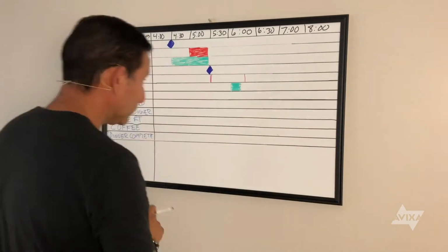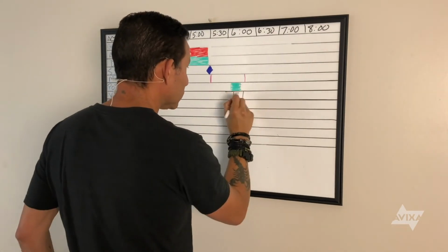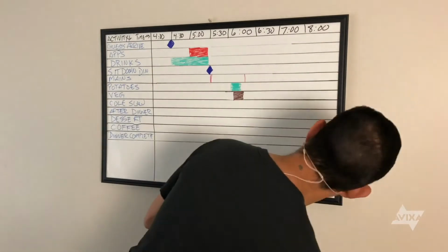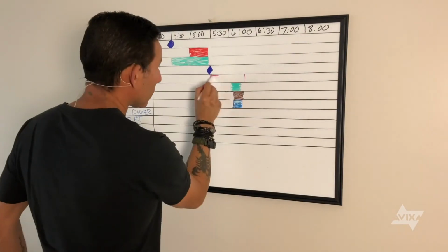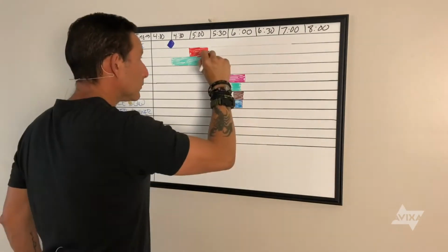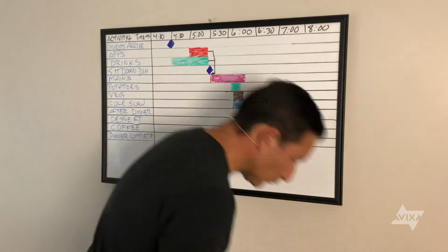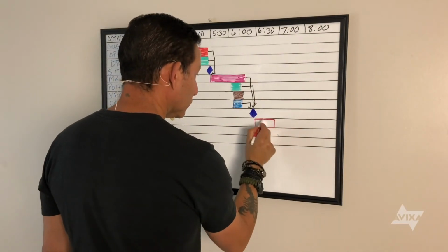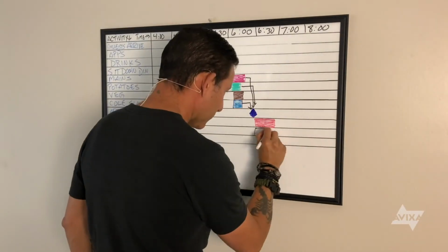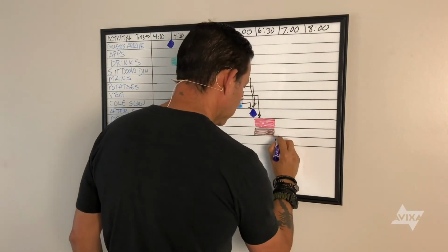Since some tasks must be completed before others may start, the Gantt chart identifies these types of dependencies in a manner that clearly shows their sequence. For example, walls in a room must be finished and painted prior to mounting sensitive and fragile AV components. So the start dates of these tasks will be identified as dependent on the end dates of the room preparation tasks.